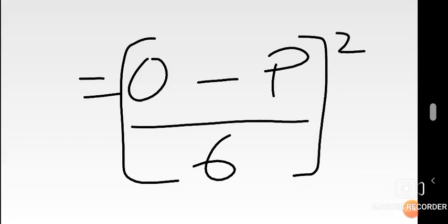I said O minus P, and I might even have swapped this, but okay. You can write it as P minus O, or O minus P, because either way, if you get a negative, when you square, the negative disappears. So let's just go with the same one on the screen for variance. I'll abbreviate it as VAR, the variance.